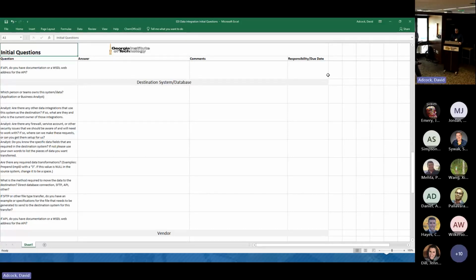The next document is the data usage request form. Data stores approval is a key part of our process. Without the necessary approval from the data stores, a project cannot move forward. We want to ensure that we have the data owner's permission to share the requested fields with the system that we are interacting with. The functional user that is requesting the integration will fill out the data usage request form, sometimes with the help of a technical team member. Once the form is completed, it will be uploaded into DocuSign and then routed to the appropriate data stores for their approval.